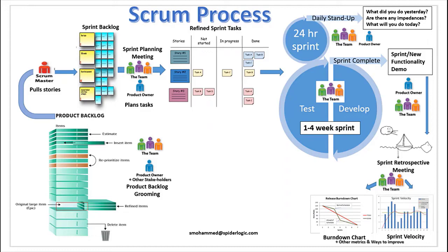Every day during the sprint, the development team and the Scrum Master meet in a short 15-minute stand-up meeting called the Daily Scrum to discuss their individual progress and plan for the work to be completed in the next 24 hours. Towards the end of the sprint, the development team demonstrates the output of the work they have done up to now, the latest product increment and its potential business value. They refine the product backlog in preparation for the next sprint iteration, and the process begins again. Usually the duration of a sprint is a minimum of 1 week to a maximum of 4 weeks.